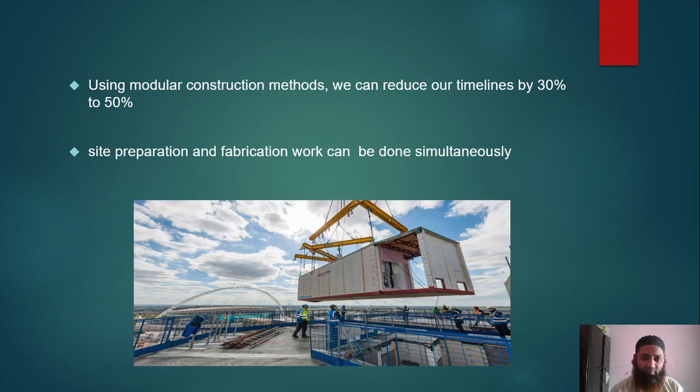Site preparation and fabrication work can be done simultaneously. You can see the site preparation can be done as well as the fabrication work can be done simultaneously. Whereas the structure is being casted on the site, the other elements are brought to the site and there they are assembled. This can be done simultaneously. This is what is happening where we are saving the time.